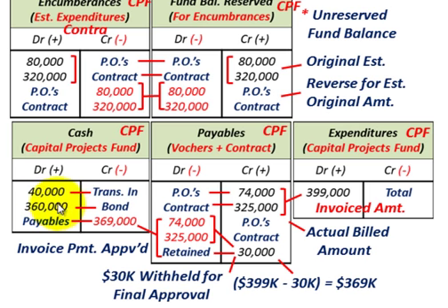We had a total of $400,000 for this project, but now we're going to use up $369,000 of the $400,000 here for those POs and contracts, and the $369,000 wouldn't include that $30,000 that's being withheld here. But you can see if that gets approved here, what does that bring up? $399,000 here total cash that would be going out here versus the $400,000 coming in. So pretty good cash flow here based on those original estimates.